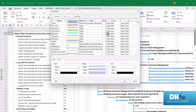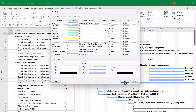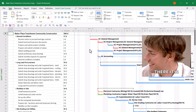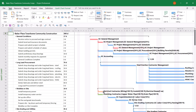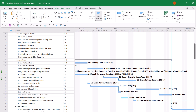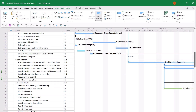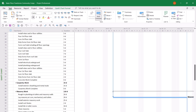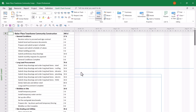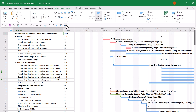Now let's go ahead and take a look at what the Gantt chart looks like. When I click the OK button, the bar style formatting will be applied immediately. And there we go. As I scroll through the project, there are some light red Gantt bars, there's an orange, there's a green. There's a very light blue as well. You can see that the Gantt bar colors have been formatted according to who is doing the work on the task. This is automatic Gantt bar formatting using custom flag fields in Microsoft Project.